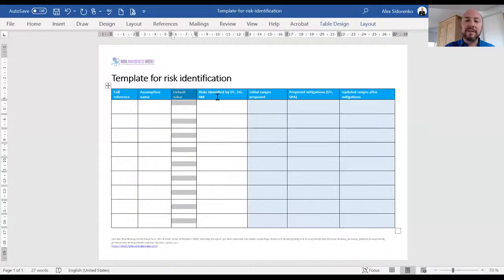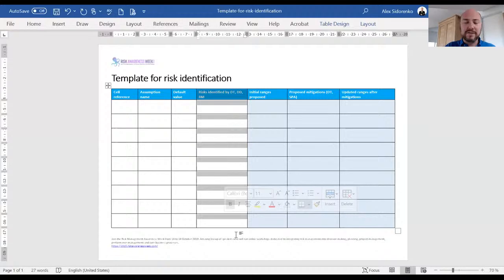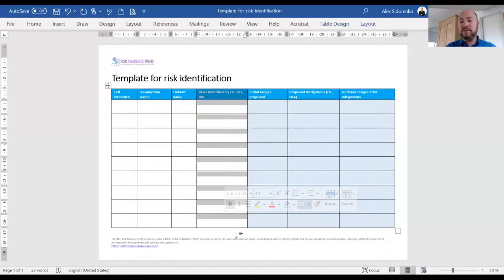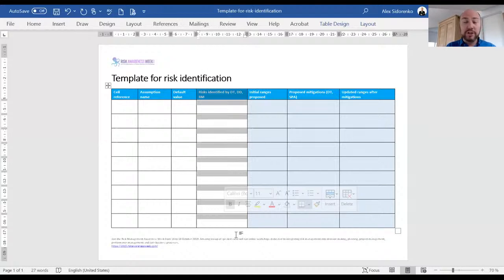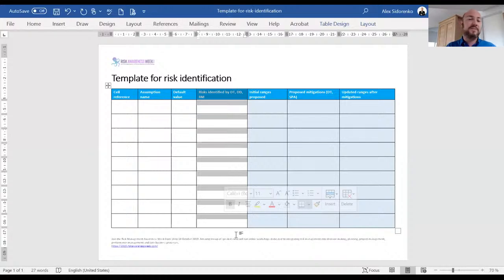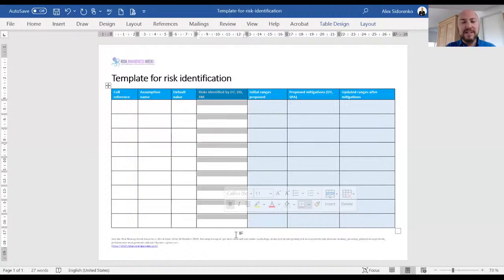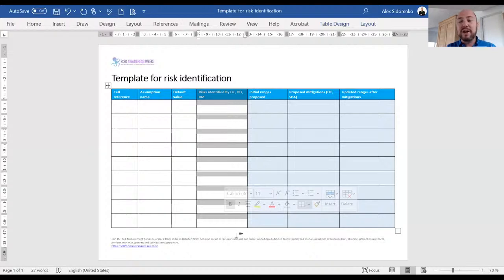The next column, this is where the fun starts. This is when you start identifying risks. This is where you have your little checklists to make sure you haven't forgotten any risks. This is where you look at your due diligences, external reports, third-party information, statistics, incident data, market forecasts. You look at anything you can find that is relatively objective. And if you don't have that information, then you talk with experts. You calibrate them first, and then you talk with them. But the idea is that you're trying to identify the risks relevant to each assumption.